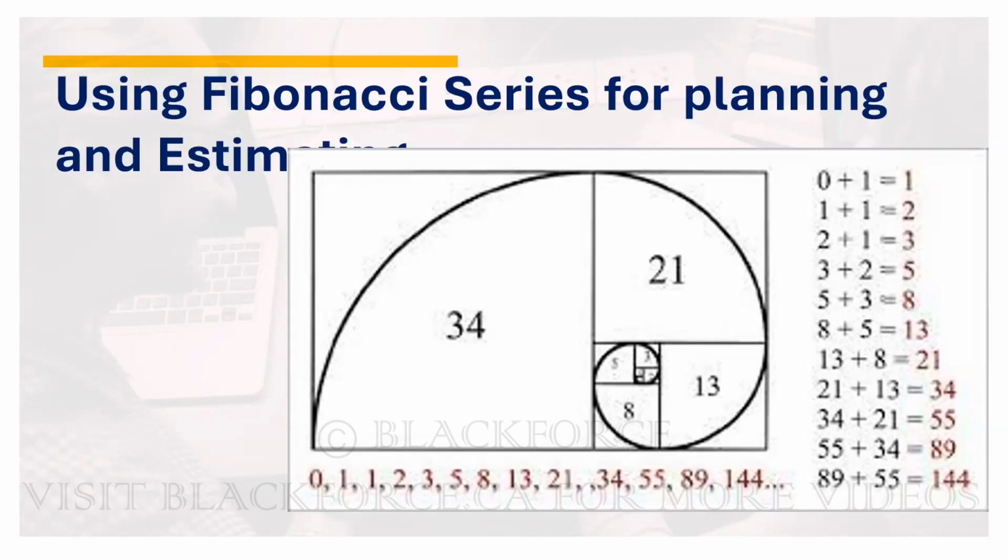Yes, it sounds like you need to have a foundational reference point for effort. Exactly. So that will be your benchmark to determine your estimation. Very correct. So let's say for what we are documenting before, login. We can say, oh, login, how long will it take me to create a login page? I need to have the page, what should be on my login page, username, the password, and all that. Okay, so you now use it to estimate how long it will take me to do a title track.